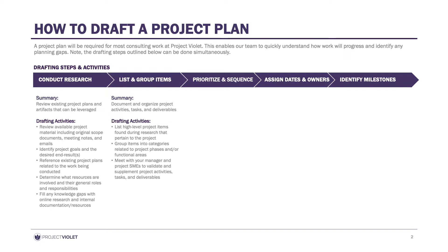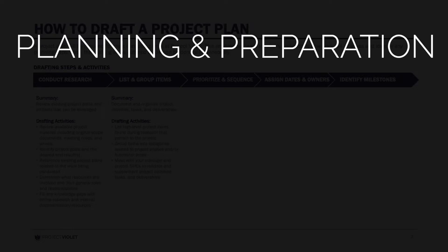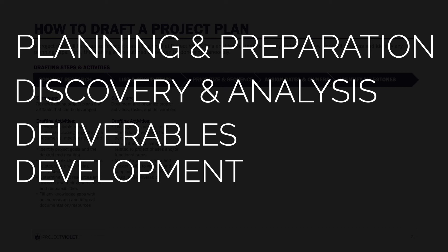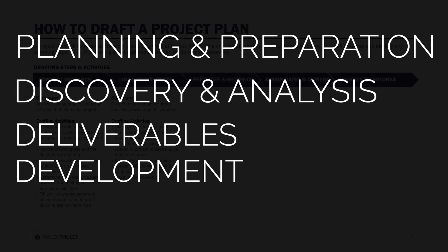If you don't know where to start, you can always begin with these four categories: planning and preparation, discovery and analysis, deliverables development, and finally ramp down and close out.